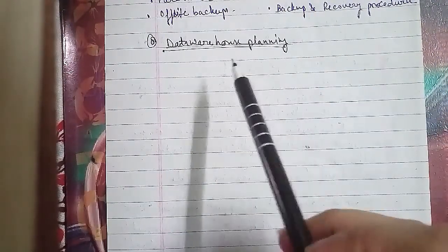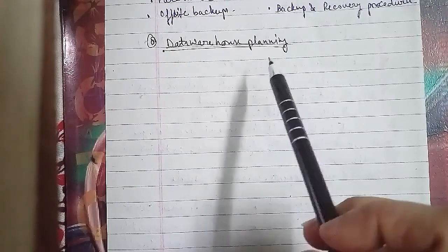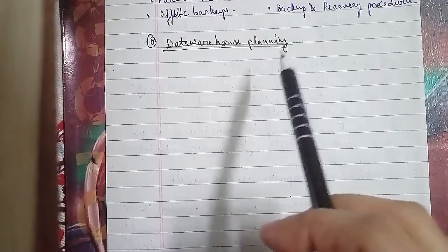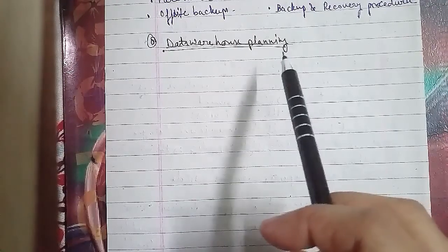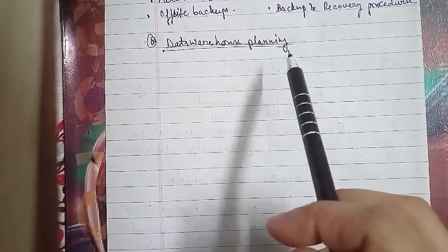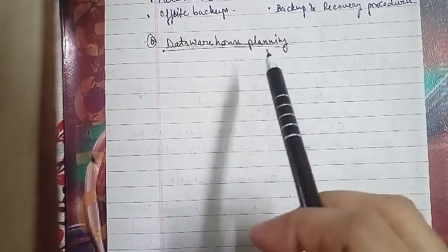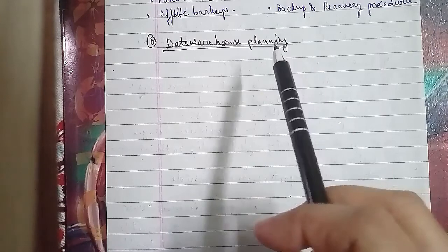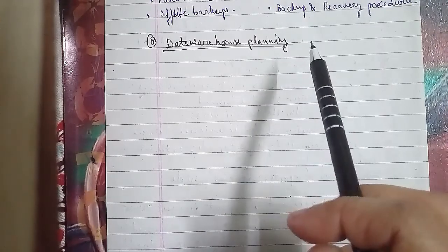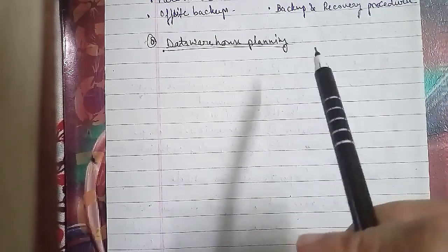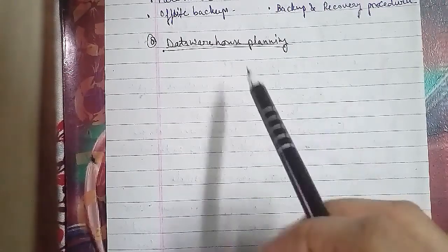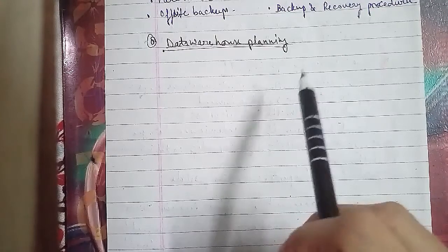First we have to know about data warehouse planning. Data warehouse planning details the preliminary scope of one warehouse rollout by obtaining detailed user requirements for queries and reports, creating a preliminary warehouse schema designed to meet the user requirements, and mapping source system fields that feed the warehouse schema fields as well. The team gains a thorough understanding of the effort required to implement. In most cases, planning projects typically last between 5 to 8 weeks.